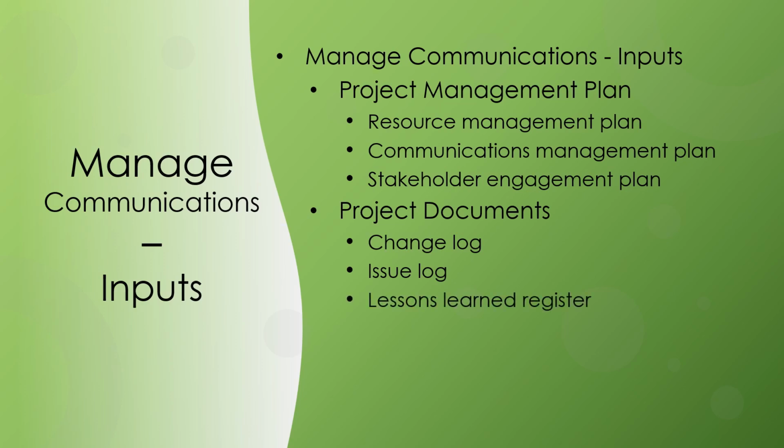Lessons learned register: lessons learned earlier in the project with regard to managing communications can be applied to later phases in the project to improve the efficiency and effectiveness of communications and the communication process. Quality report: information in the quality report includes quality issues, project and product improvements, and process improvements. This information is forwarded to those who can take corrective actions in order to achieve the project quality expectations.